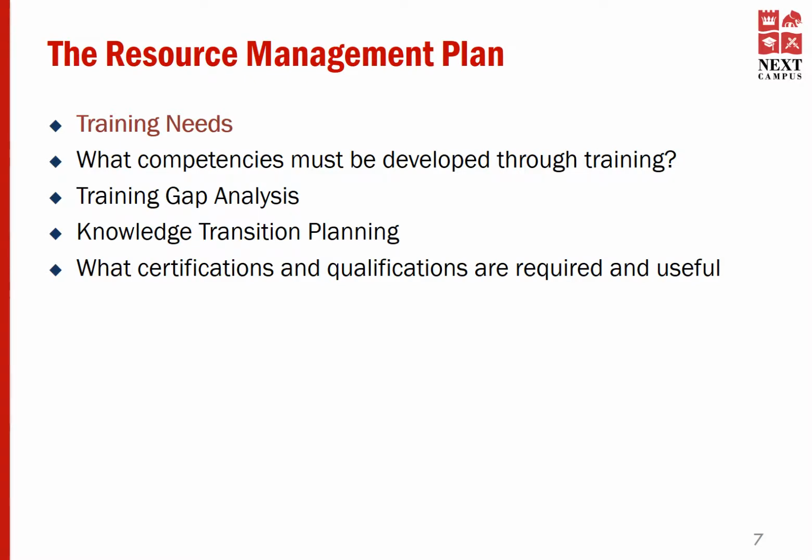Initially, you may conduct a training needs analysis to identify what kind of training will be required for your project team. Once you have the gap analysis, the next step for you would be to decide the budgeting and the timing for your training needs. Accordingly, allocate the trainings before or during the project. Once that is done appropriately, you'll have a team who is capable and competent of doing the right job.